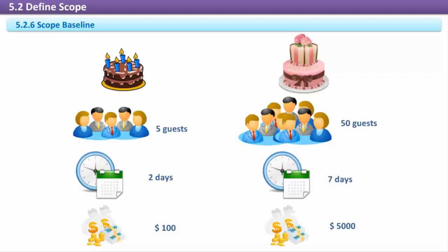The purpose of any project management baseline is to provide measurements off the approved plans. We want what's currently been agreed upon as our measuring stick, and when we do this with the example, since the original plan was altered and agreed upon by all the stakeholders and we performed exactly as we expected, the project should be considered a success.